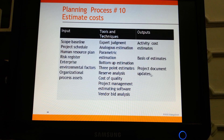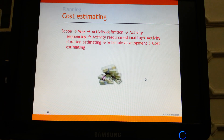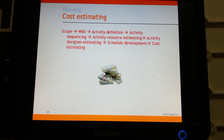When we do the cost estimate, sometimes we may have to go back and update the charter or the plan based on the costs we are getting, so any document can get updated at any time. The sequence was: define scope, decompose into WBS, decompose further into activities, sequence those activities based on dependencies, then move into activity resource estimation.